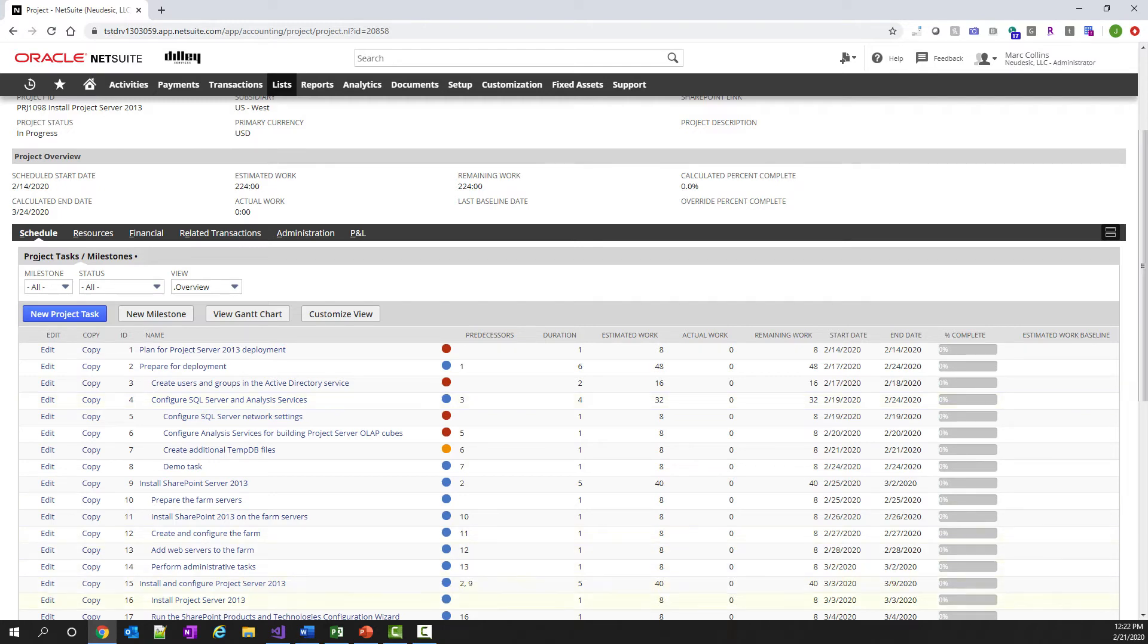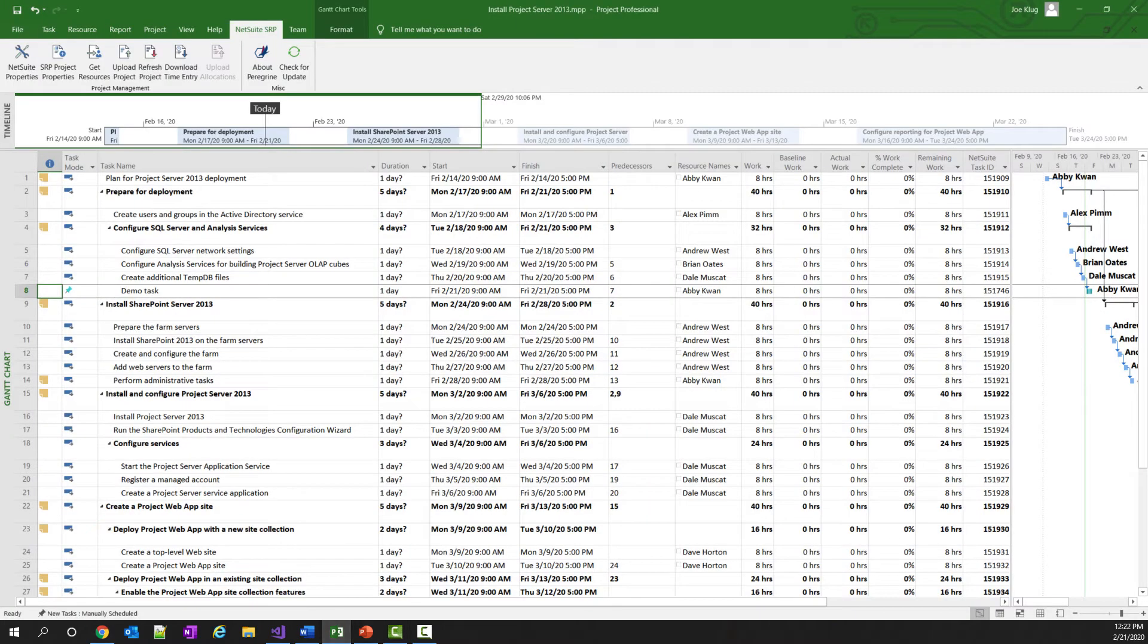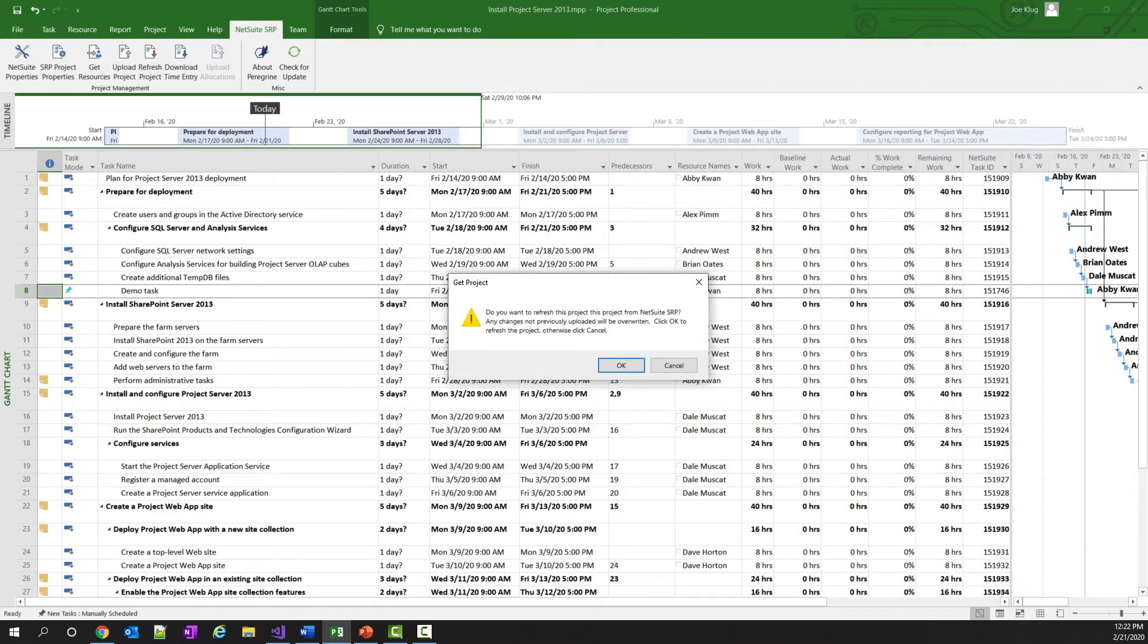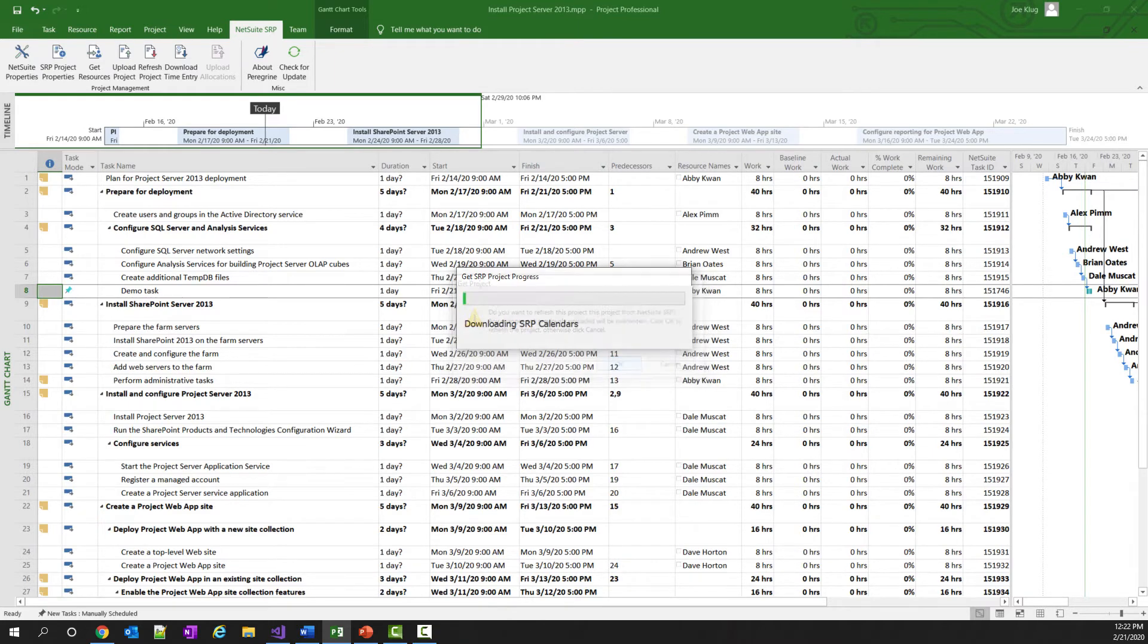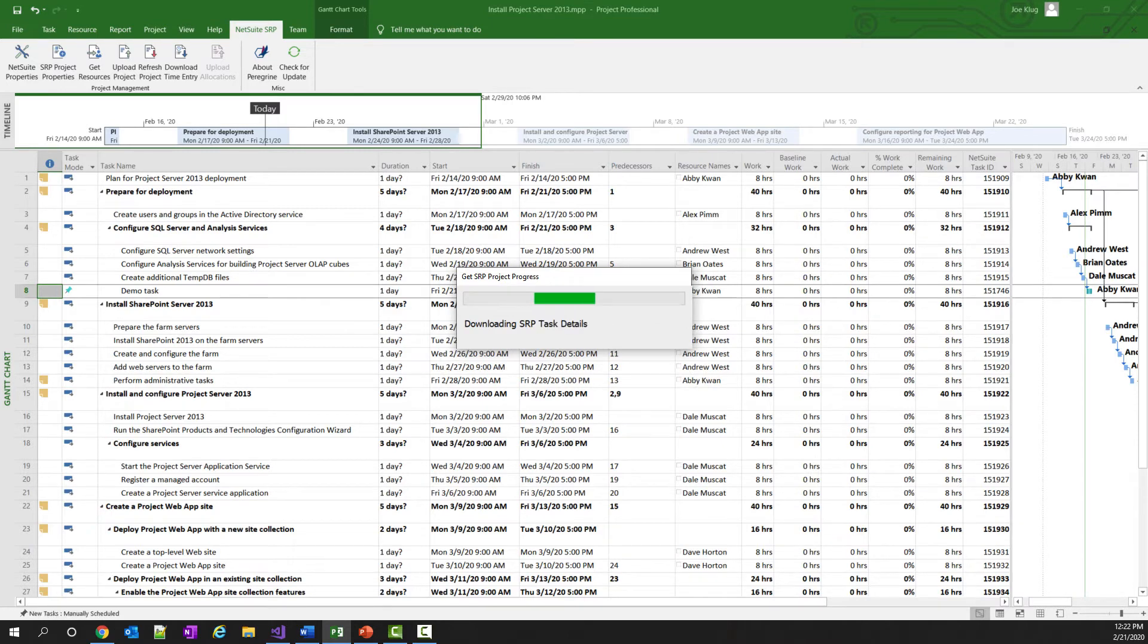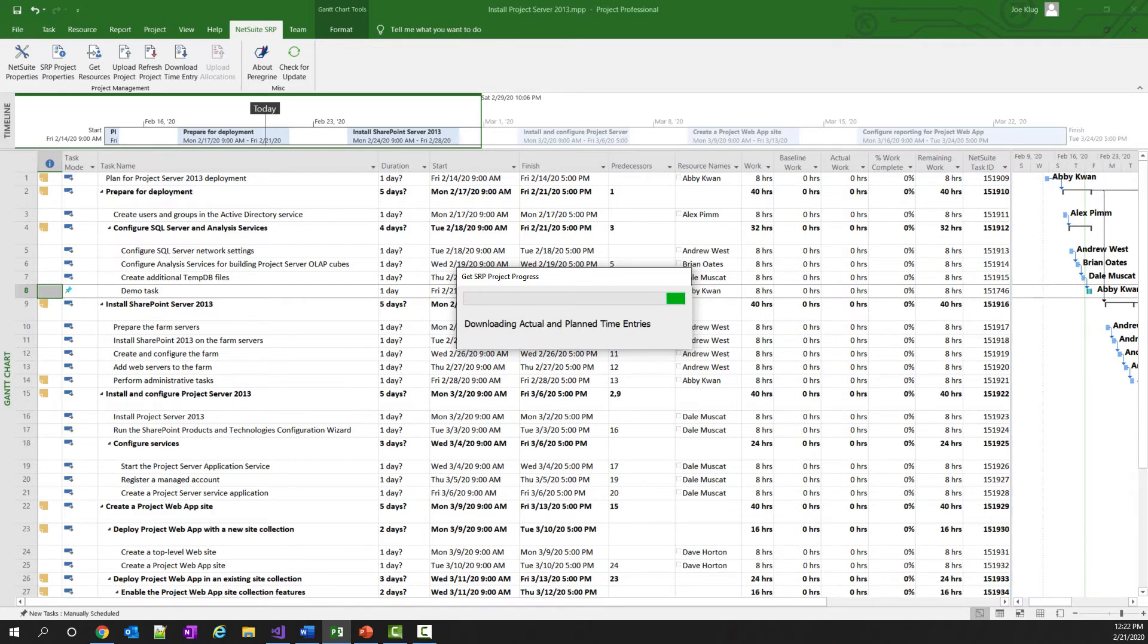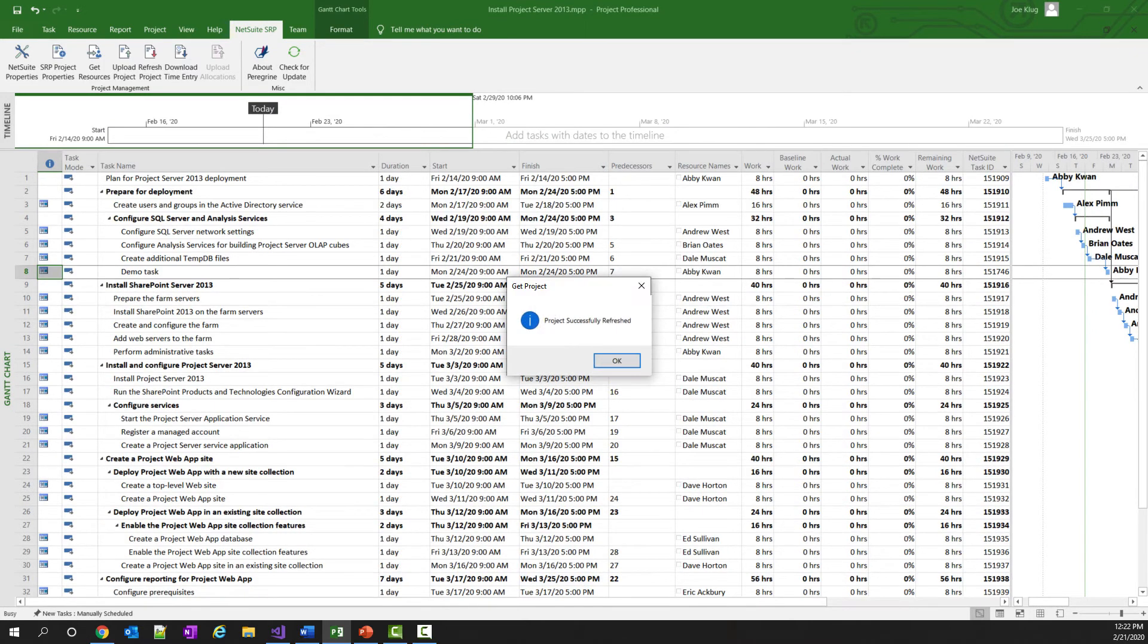And now you've got this change up in NetSuite, but you want to see it in Microsoft Project as well. Well, no problem. All you have to do in Microsoft Project is click on the Refresh Project button. And Refresh Project will first warn you that it's going to overwrite any changes that you might have made locally. And once you click the OK button, it'll go and it'll pull those changes down and display them inside of Microsoft Project. So you don't have to worry about making changes in Microsoft Project versus NetSuite. You can always refresh your Microsoft Project version by just doing a Refresh Project.